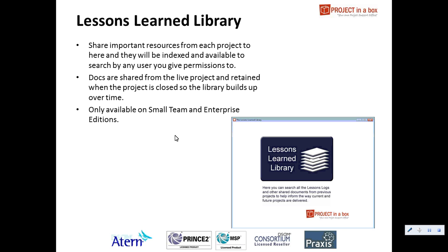Lessons learned library, a very simple method template to enable you to store and interlink the lessons, issue logs, risk registers, etc. from all of your projects into one place. They're indexed for searching so that you can produce a library that people can go into and find. Even though the project may have disappeared, these documents are retained in the library so that you can search and find out issues that were had on previous projects.